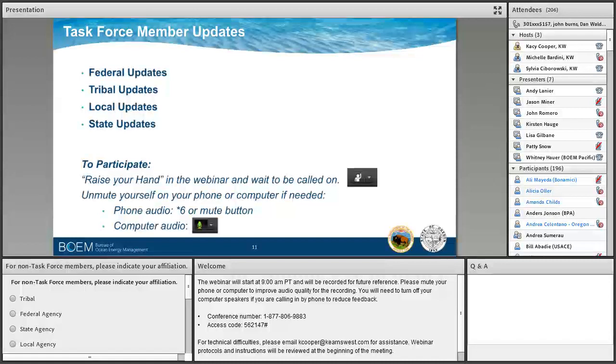We also encourage consideration of effects of multiple adjacent projects. Wind energy areas often get broken into multiple leases and often with different developers. We encourage planning for regional transit early in the process with the Coast Guard and other ocean user groups. Identification of transit corridors and appropriate spacing and orientation of multiple adjacent projects prior to any COP submission is critical. Additionally, these decisions can have direct effects on fishing, both commercial and recreational, which need to be considered.